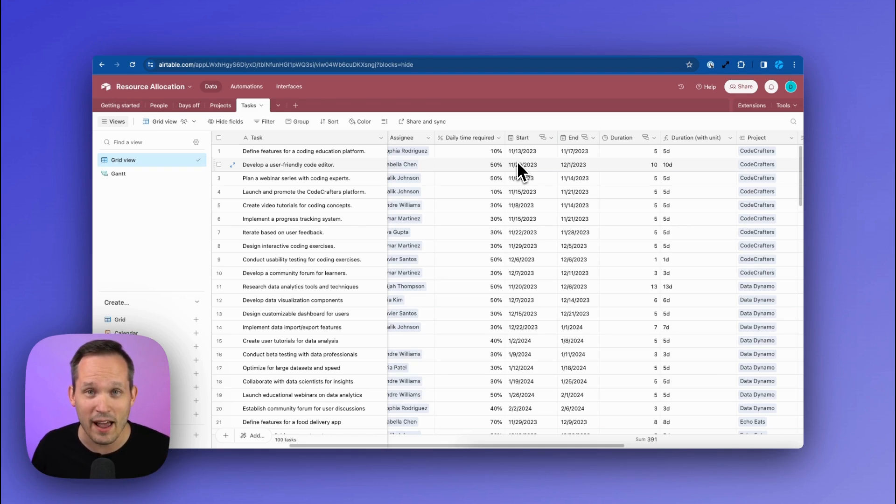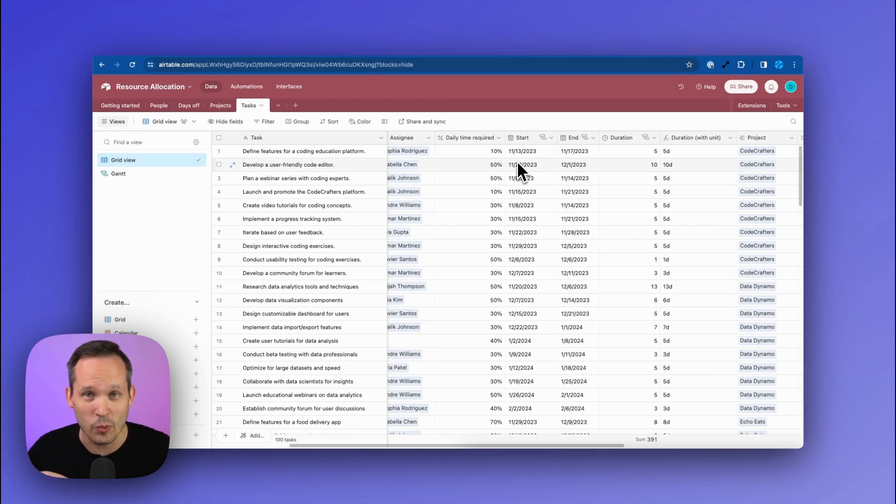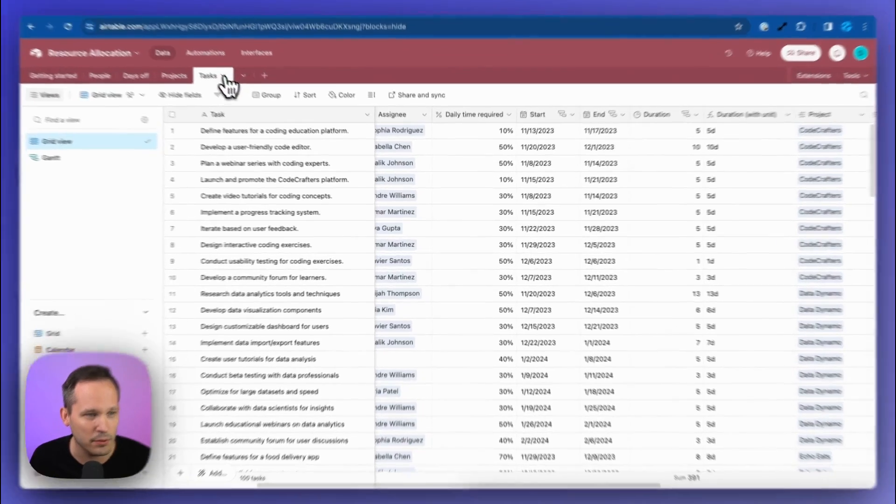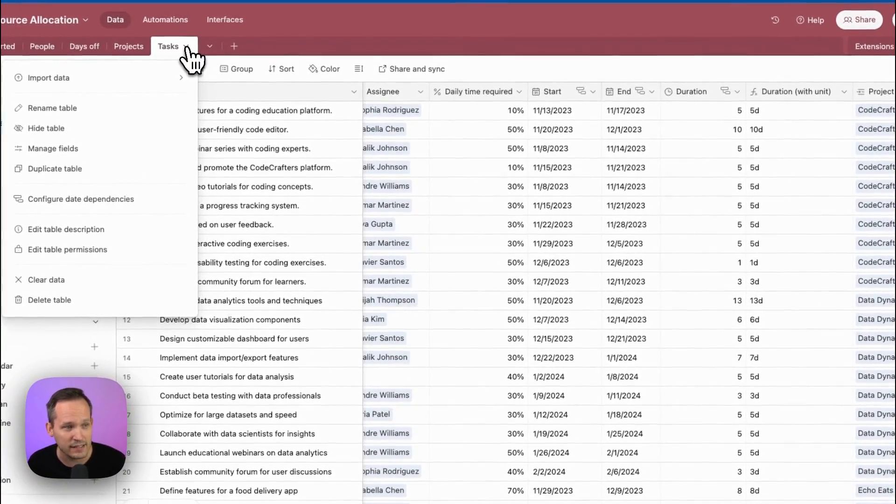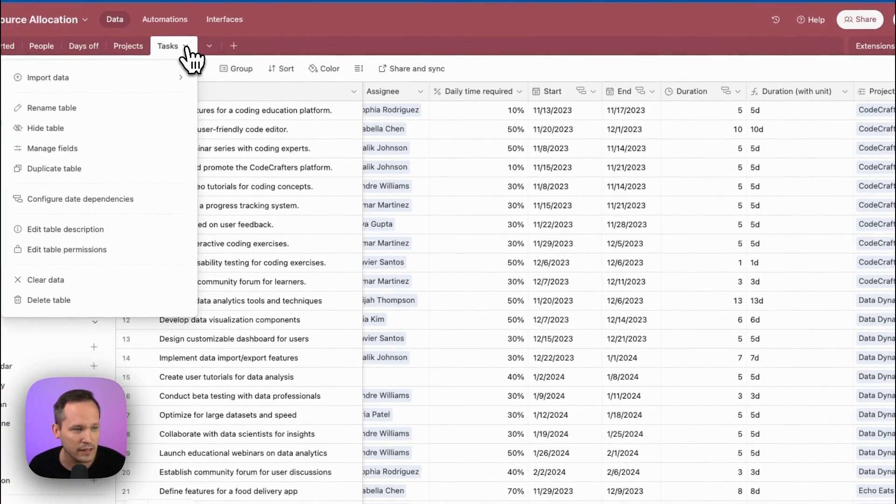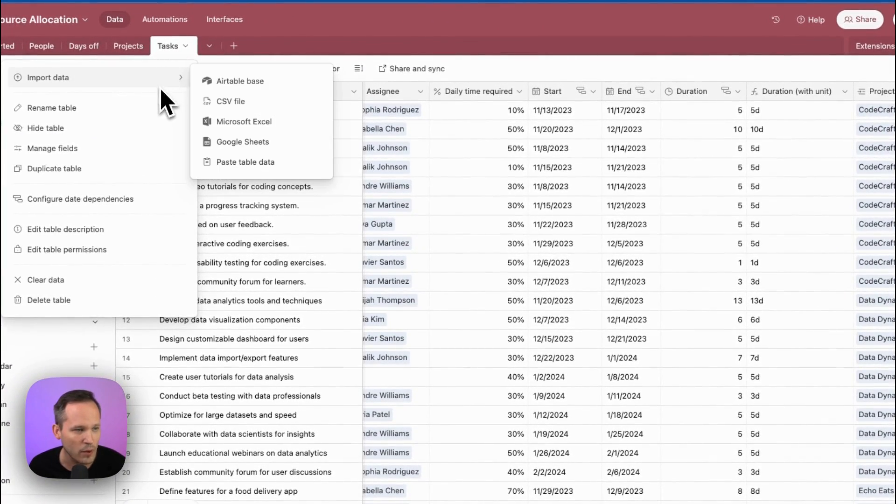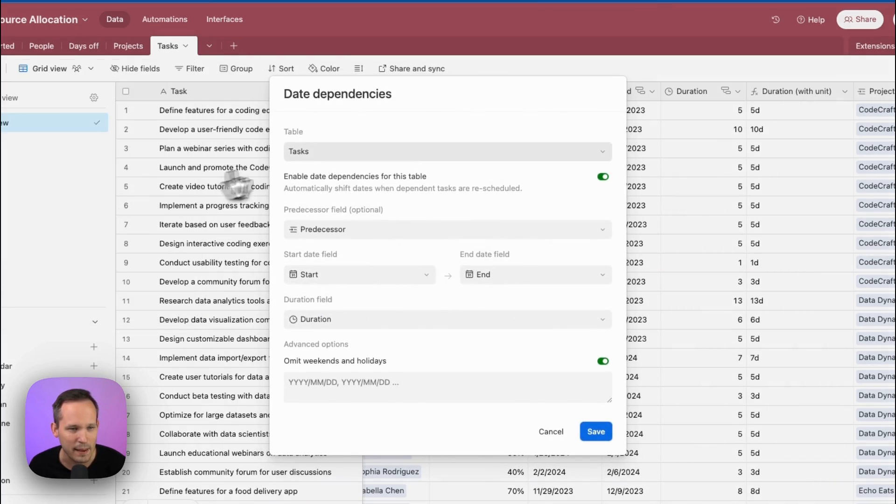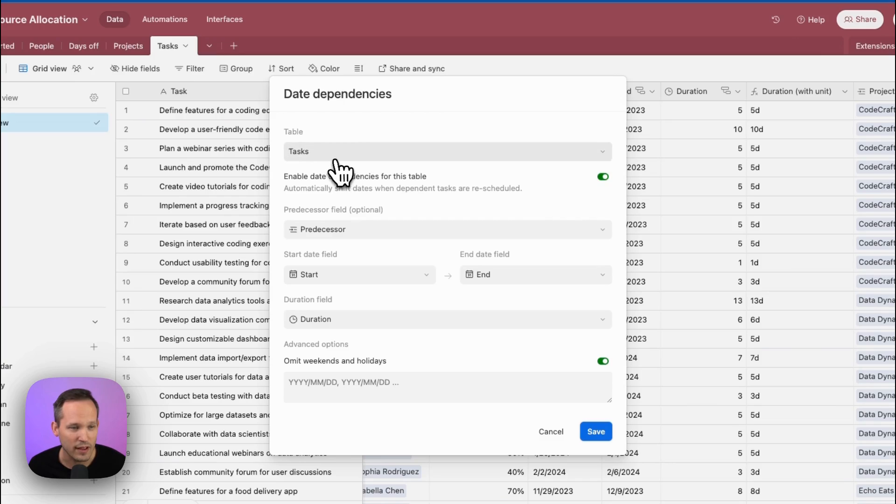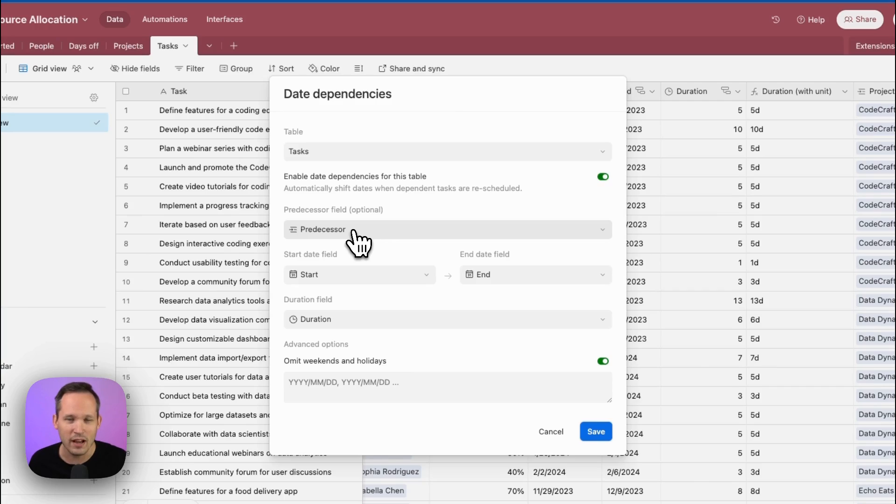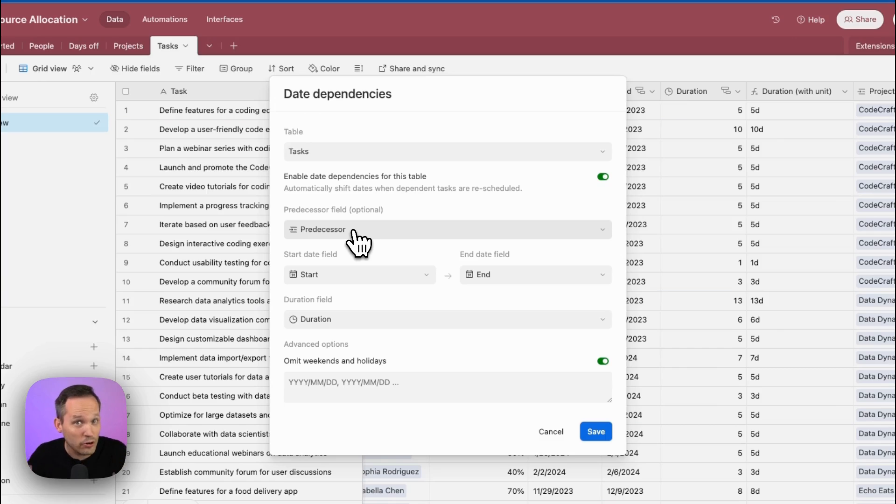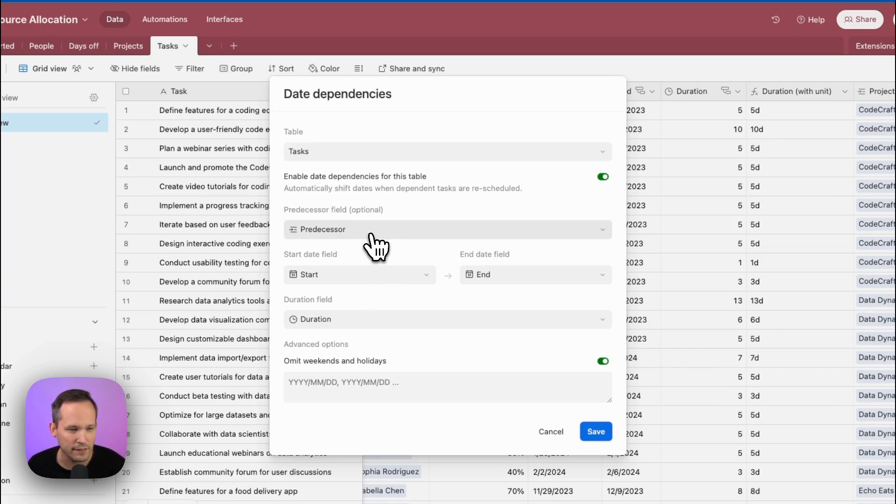And as such, we now have it at the table layer where we're actually making those changes. So here, if we look at our table of tasks, this is where we can click and say we want to configure our date dependencies. And so we're doing it at the table level here. We've got our tasks, here's where we define that predecessor field. And again, we cover this more in depth in a different video where we're going over Gantt. But the predecessor field is just a linked record field. And we're saying, what are the tasks that come before the current task that we're on? And so that's where we define this in our configuration.